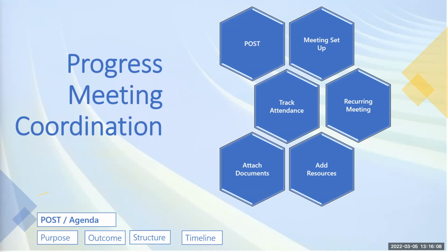And I wanted to show how to set up a meeting. You have to be proactive as well in setting up your meetings. If you know that this is not a one-off meeting, because people's diaries and calendars can be pretty busy at the beginning of the new year, you need to be very proactive in making sure that you set your meetings way ahead. So if it's a meeting like the CAB, change approval board, that is happening every 2 weeks, that one you are aware of.